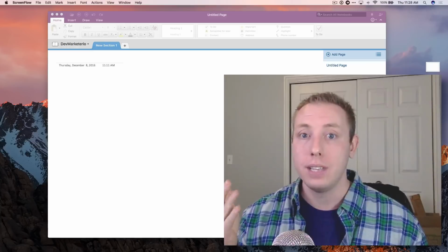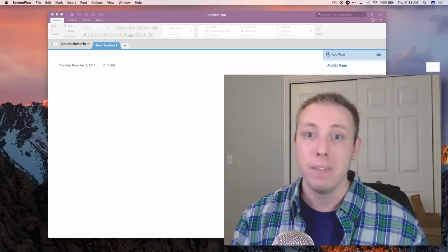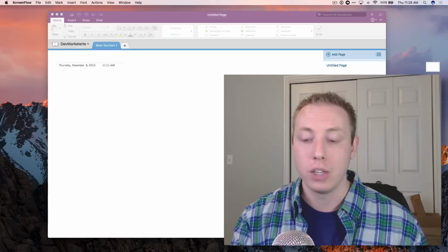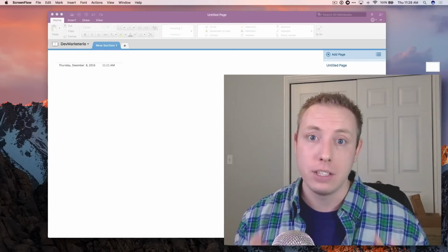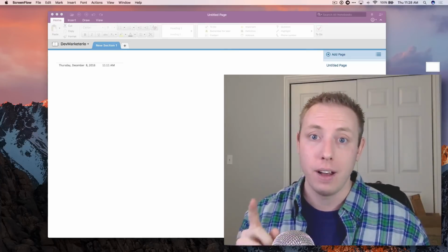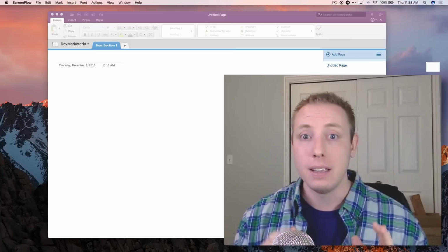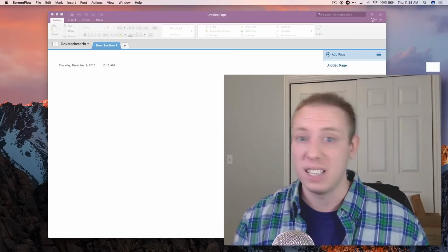If you can wait and you say, hey, we're not actually deploying the website until we get that final installment, then you'll make sure you actually get paid for the project. And again, I'm upfront with all of that. It's always in the scope of work. When they sign that scope of work at the end of the discovery phase, before we move on to the design phase, it says in the scope of work that exact same thing. It's not a surprise to them.